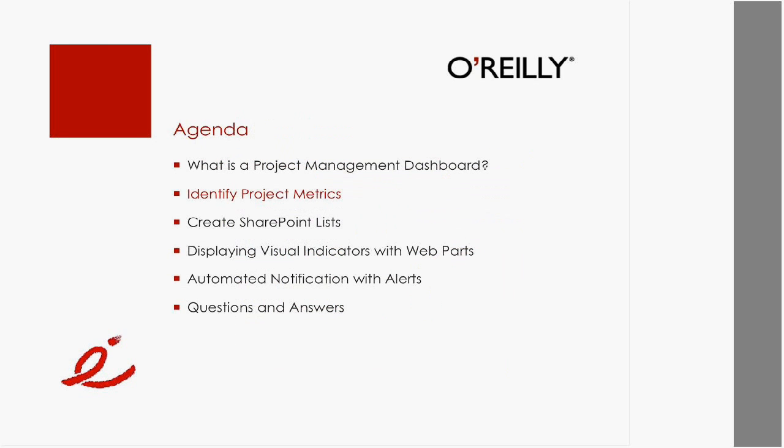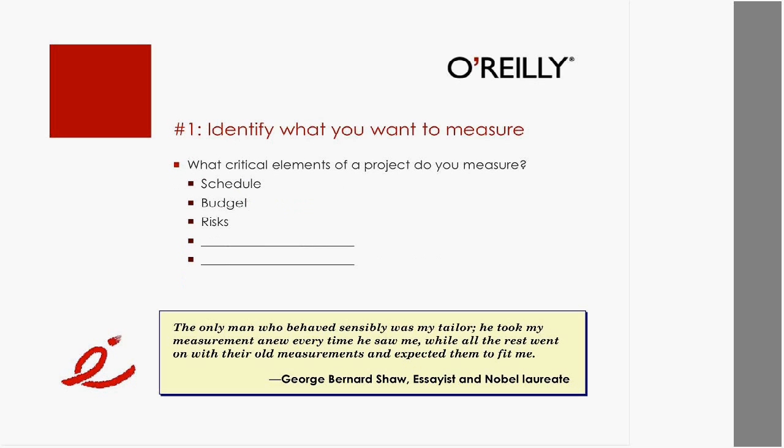What are the steps to create these project management dashboards in SharePoint? So here's my assumption, picking up from my previous webcast: you already have a project website you created in SharePoint, and you want to throw a dashboard on top of it. The very first step you have to take in order to create these dashboards is you've got to identify what you want to measure.